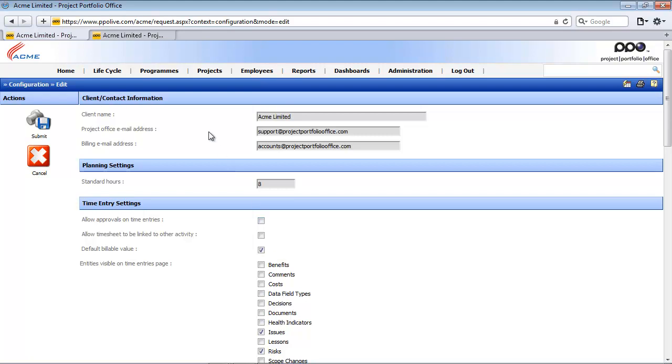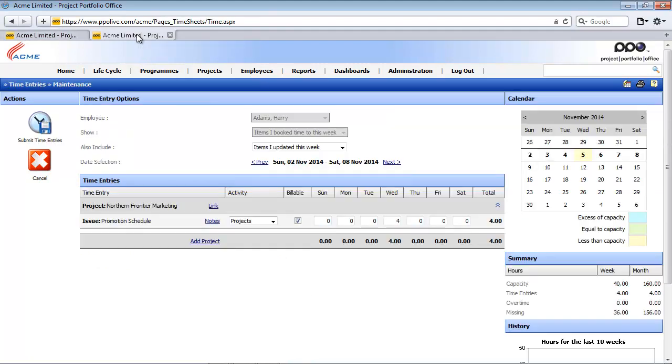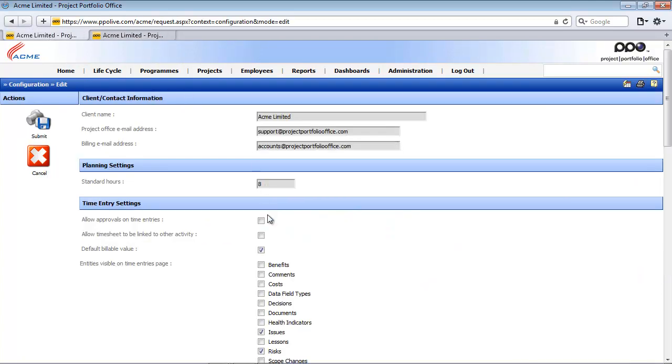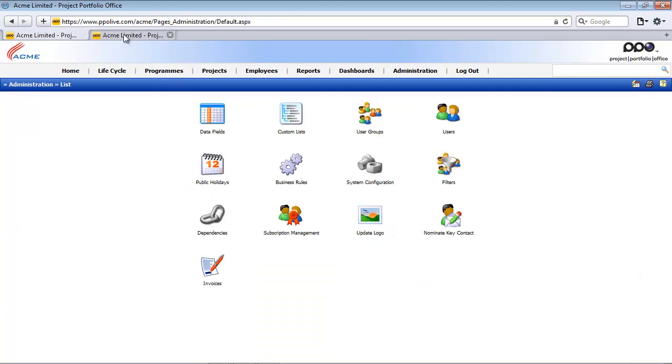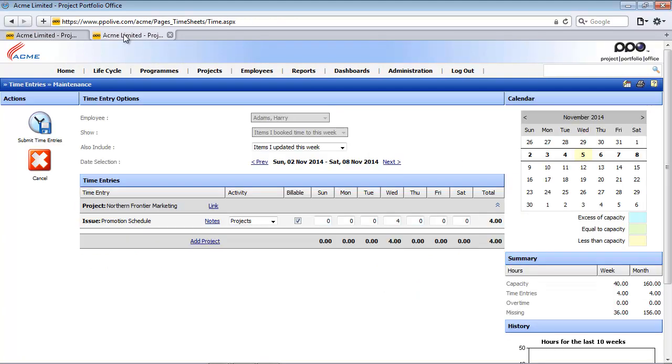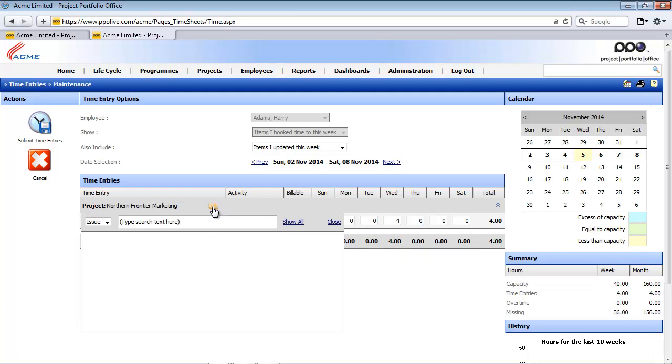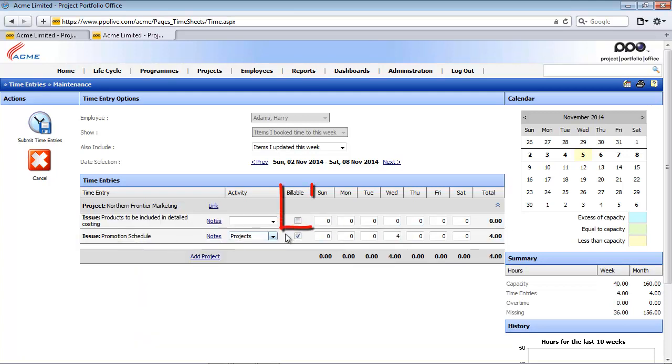So to demonstrate that I'm going to access the time entries again and note this billable option here. Currently it's checked. If I go and uncheck it and I submit and I refresh my time entries page, because I have already booked time against this record it still shows as billable. But if I go and link another item, you will see that the default value is now not billable.